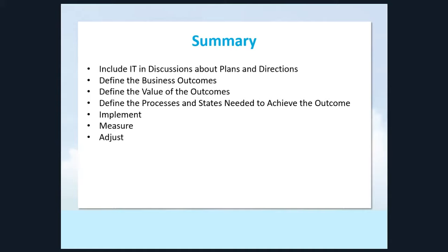We might have a business need that gets in the way of the project and causes delays. The department that we need to move needs another 3 weeks because at this point they're in their busy season, their silly season, and making that change won't be good until a future date. So we need to make those adjustments, and then go back and continue to implement and measure. So again, it's about having a process where IT is included from the beginning to the end, and IT is given an opportunity both to understand and contribute to the value of the outcomes.